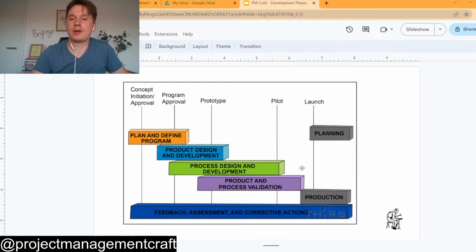Then they were trying to launch a product, but in their timeline they did not have any connection among those phases. Well, one phase is input for the next phase. What happens if there's no connection? Then you cannot identify the critical path. If you cannot identify the critical path, what you are going to manage there is going to be more difficult. And at this point, how do people start? You just start to work on the tasks that you have on hand.